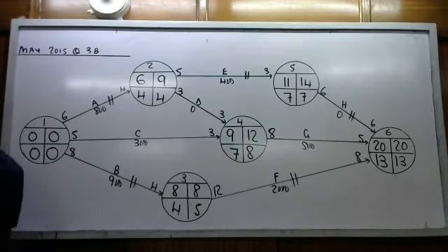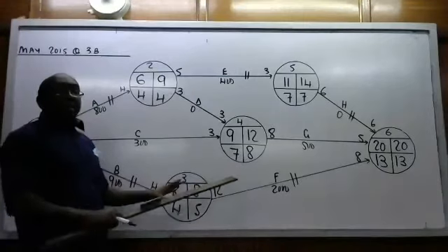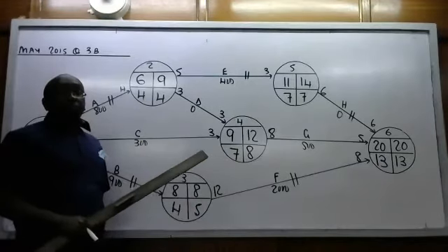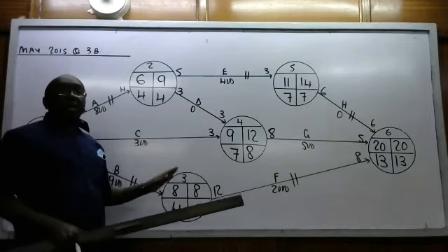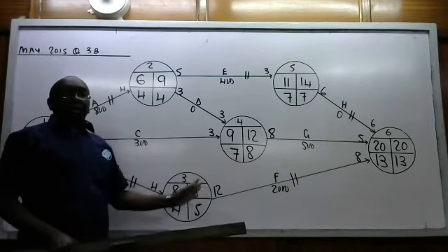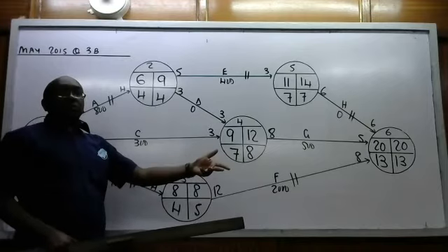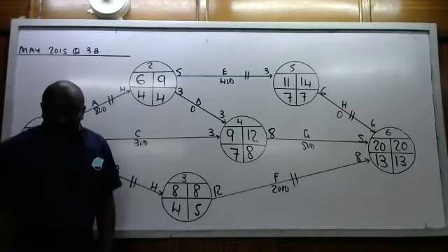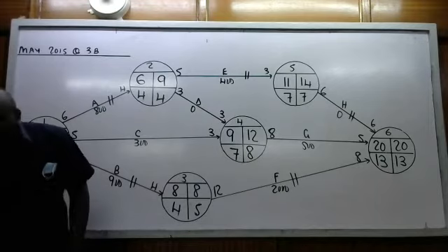So in our uncrashing, we have 2 critical parts. It's possible, yes. It's possible even when you have the normal times, just one time. Crash, it is possible to have more than 1 critical part. I think the very first question is okay too. And when you have the normal and the crash times, it is possible the critical part remains the same in the normal and the same also in crash. It is also possible that the crash will create a new critical path. Like now, what we have seen here, the crash has created a new critical path. Let's try to uncrash.